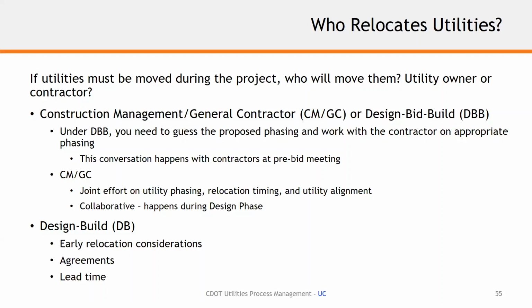went with our proposed phasing plan with the 5 miles first season, 5 miles second season. And I think the way they bid it is knowing that they could bank on the fact that they'd have a clear 5 miles rather than a really kind of clouded, not sure if I'd have a full 10 miles to work in scenario. So that's the benefit of a mandatory pre-bid meeting for utilities that are high risk and need to really be focused on and showcased to those bidders.